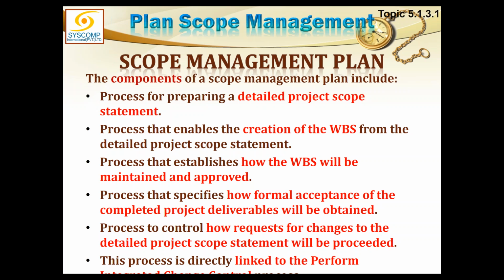This process is directly linked with the integrated change control. Why? Because all the changes are actually approved or rejected by integrated change control, which is the process of integration in monitoring and control. And you remember this is the same process where the change requests are sent. All the change requests, no matter from where they are coming, they are actually being processed by this process, perform integrated change control. This is its responsibility to process any change requests.